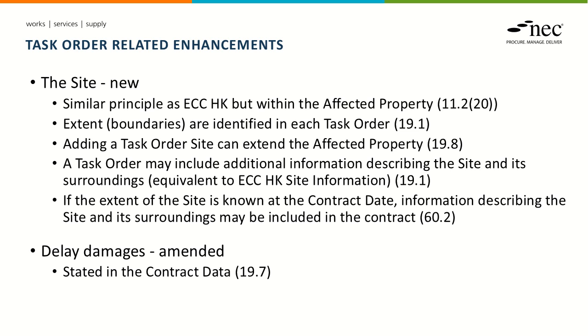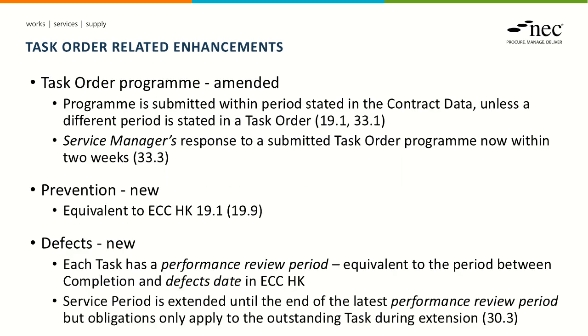We've also tweaked the provisions around delay damages insofar as what the delay damages are would now be stated in contract data as opposed to being stated in the task order. NEC4 TSC already had a task order program along with the contractor's plan. We still have a task order program. We've just created a little bit more flexibility in terms of how quickly the task order program is submitted. And as you can see in the first bullet, it's either submitted within the period stated in contract data, or if there is a different period stated in the task order, within that different period.